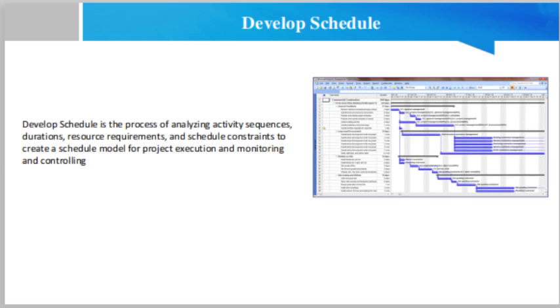Key steps include defining the project milestones, identifying and sequencing activities, and estimating durations. Once the activity start and finish dates have been determined, it is common to have the project staff assigned to the activities review their assigned activities. The staff confirms that the start and finish dates present no conflict with resource calendars or assigned activities on other projects or tasks, and that they thus are still valid.